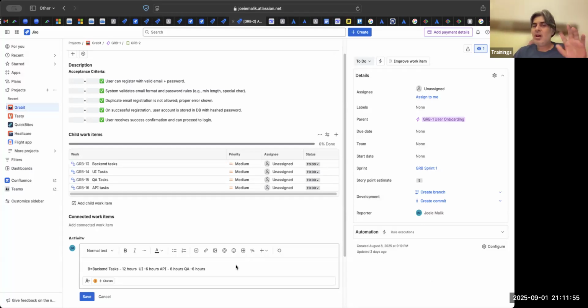Now, this is a very easy method to use because you don't have to estimate the entire story. So the UI guy does a UI estimation, the DB guy the DB, Python, QA. If it's a UX design they are also creating, the UX designer can also ask for his hours. So all in all, suppose for this there were the 4 tasks. So 12 plus 6, 18 plus 6, 24 plus 6, 30. So this is 30 hours. 30 hours is how many points?